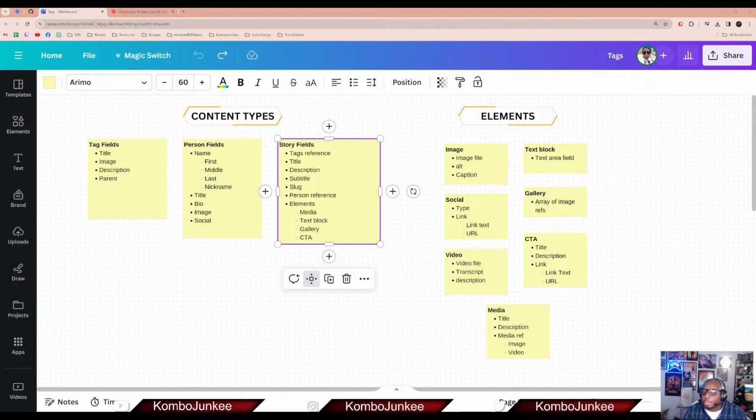So those will be done in sprints. You may say that the first layer and the second two layers are done in one sprint, and then that final layer, that final solving of the cube, is done in sprint 3. So that's really what Scrum is. It's a way of breaking up a big project into smaller tasks and then divvying that work out among various sprints or iterations.